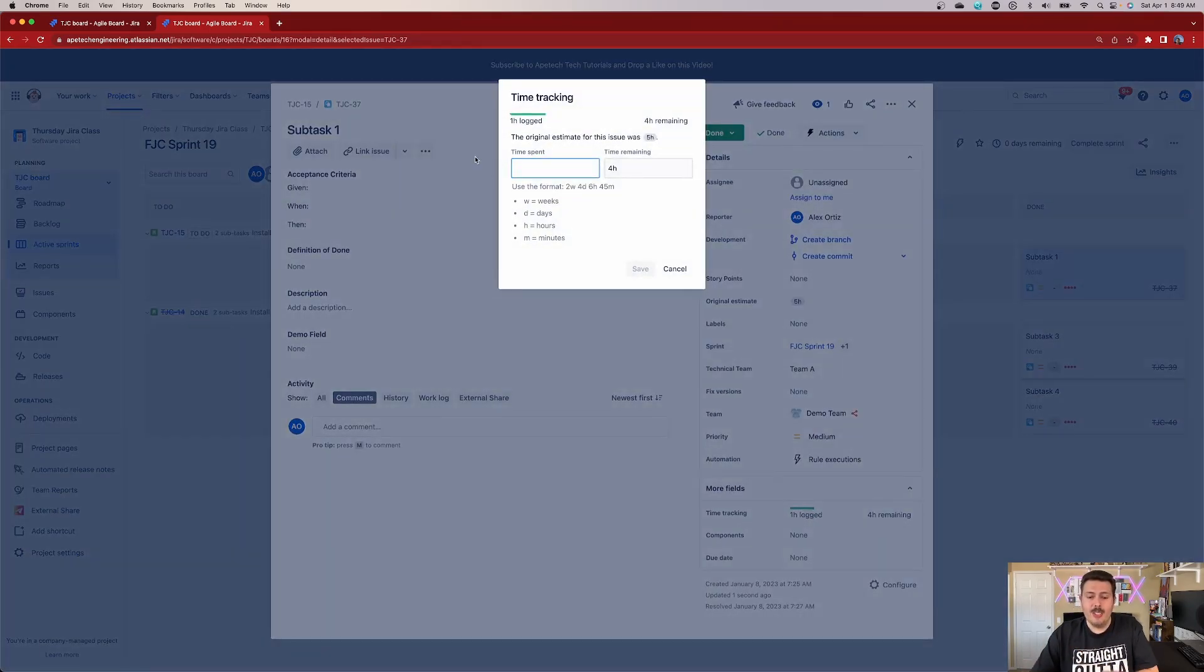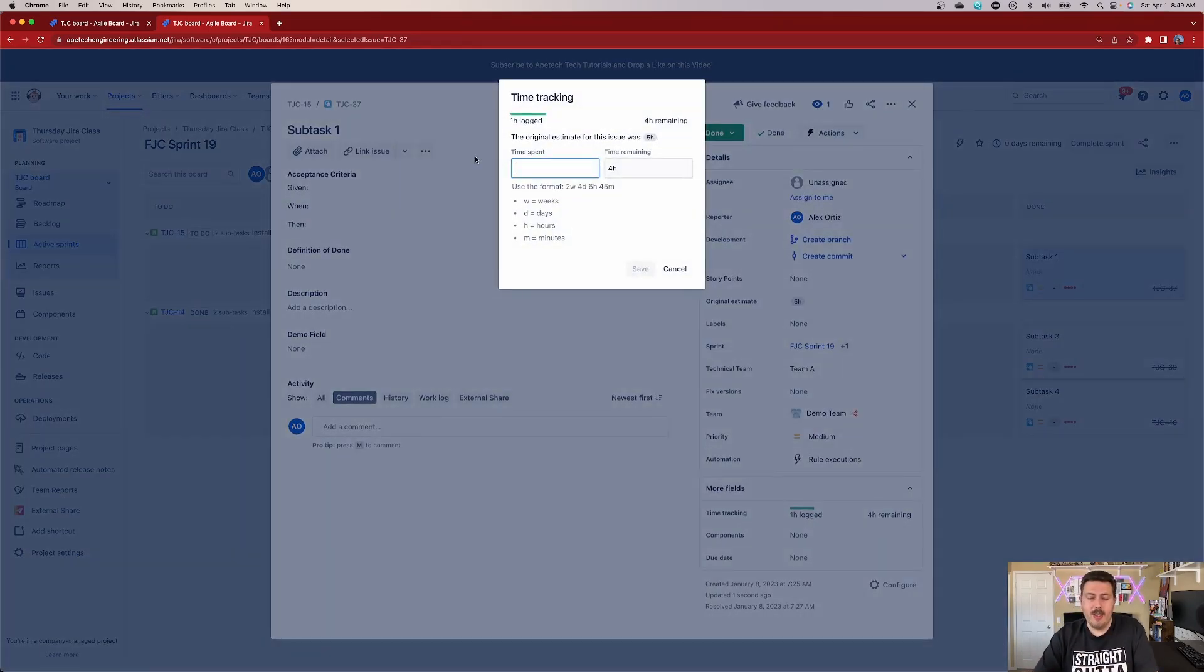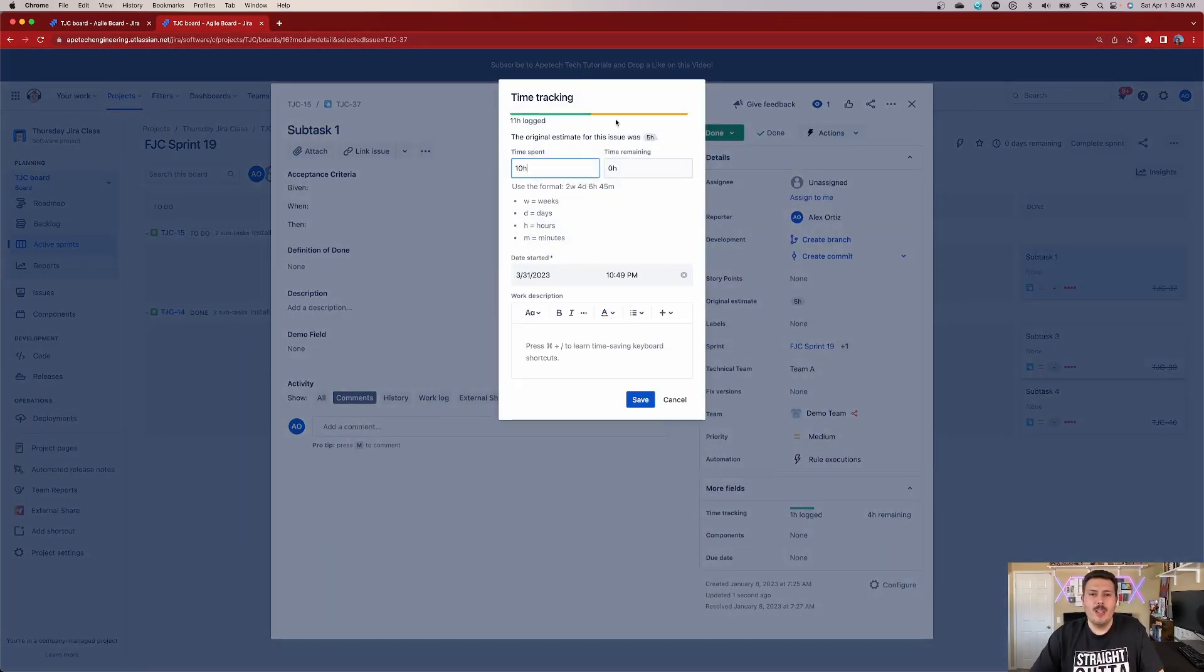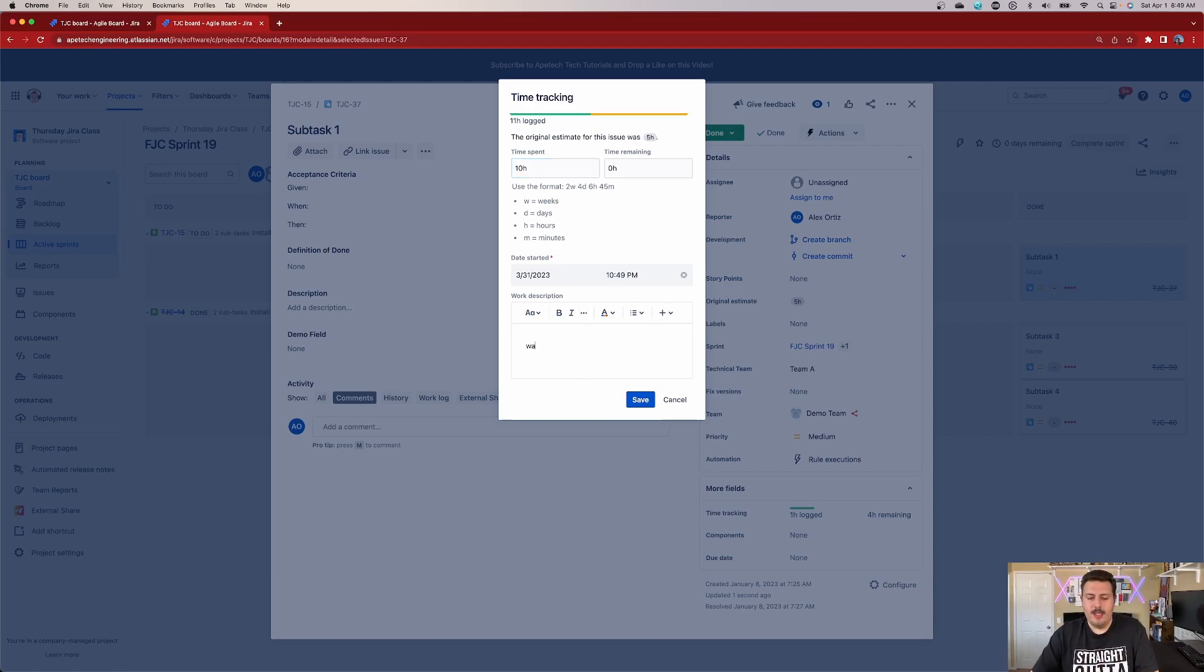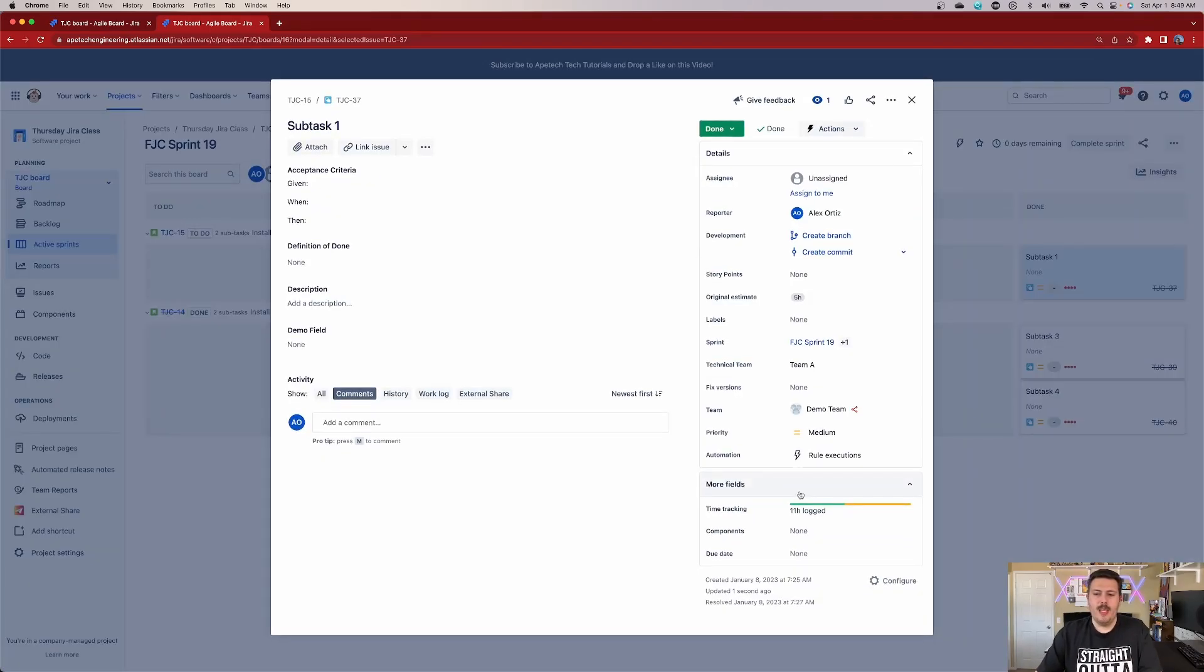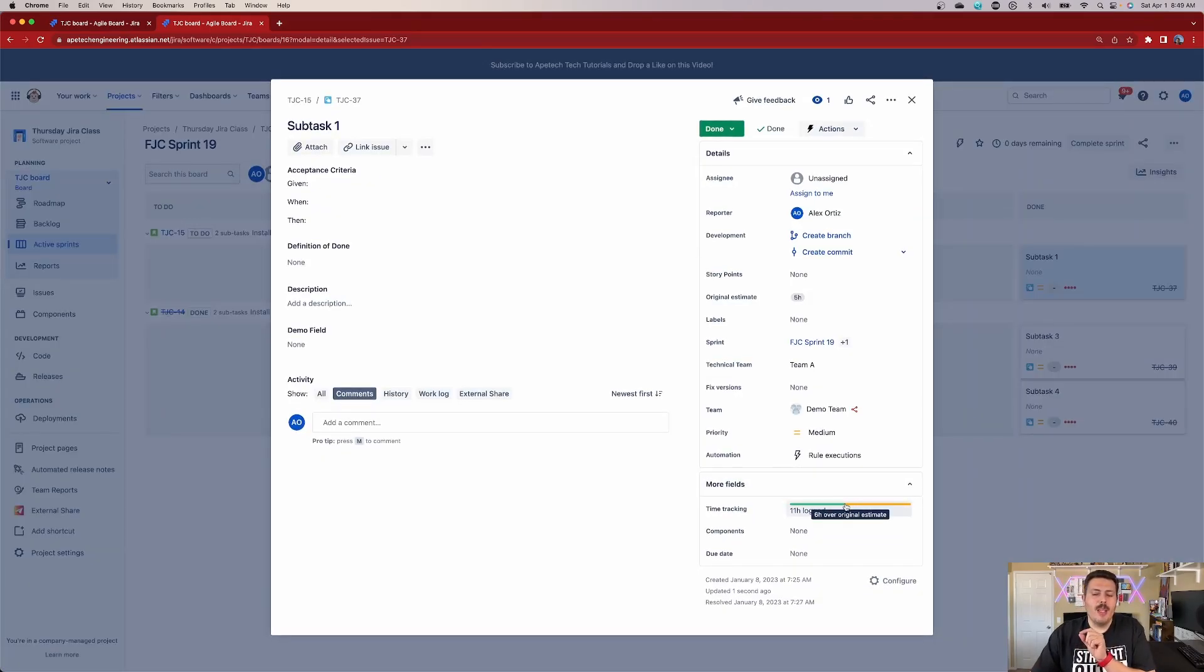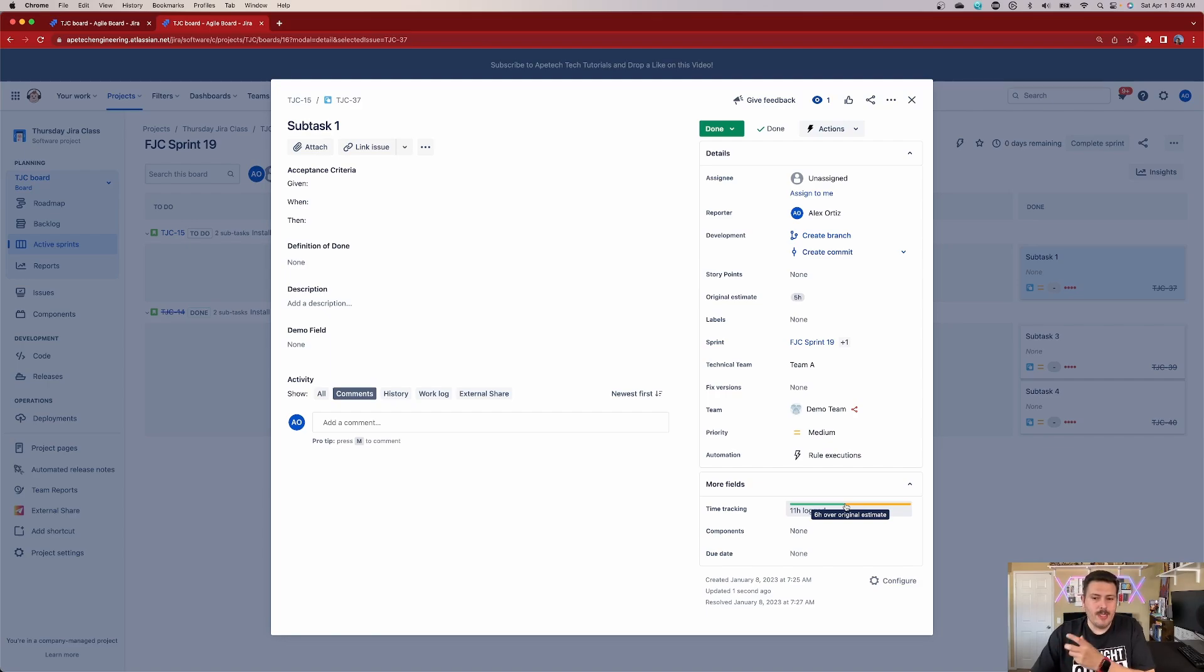And what this also means is if I go and put in like 10 hours, you'll notice that this now goes yellow because it's basically a warning. It's telling me, uh-oh, you've overcommitted here. And so the estimate will go away. And now the portion that is over the original estimate, as you can see here, six hours over that original estimate. So as you can see, this starts unlocking a lot of insights and a lot of metadata that you and your team can use.